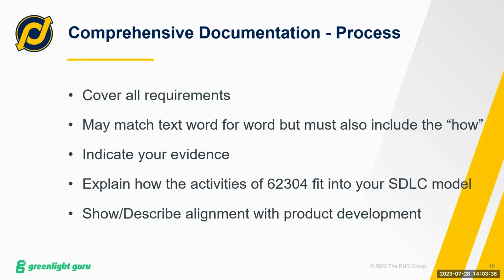This is especially important when you get to your product design validation, because your design validation is the whole entire system, so that needs to include software. We need to make sure that we've completed our software verification before the product gets to design validation, so that that can be included.